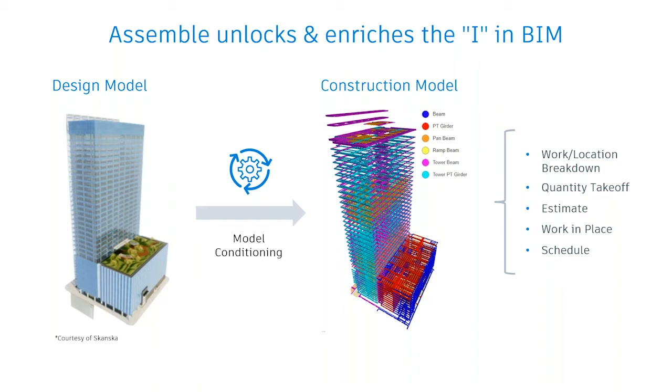So we do this through the ability to add parameters and properties directly into the model for work breakdown or location structures. For work in place, we can apply statuses, we can apply cost codes, we can import the schedule. All these construction things that, when we think about it, really should live in the design model in the first place, but that stakeholder in design isn't as concerned with construction and how that plays out.